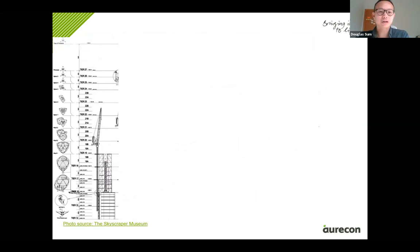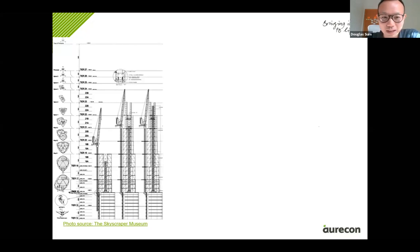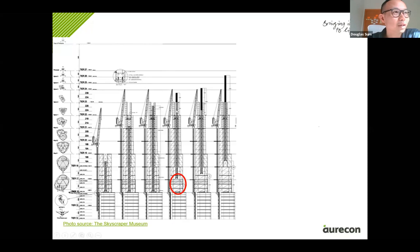This is the last tower crane of the super high rise building. And then when it's trying to become higher, you can see the one in the middle of the court, this is the pinnacle. So when you come to a certain point, it will stop, and that thing will be sitting here. And then they will start installing the cladding on this pinnacle. Think of it like a chopstick. I'm Southeast Asian, so we talk about chopsticks.